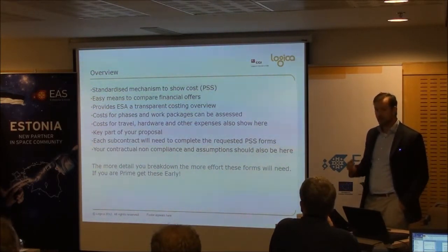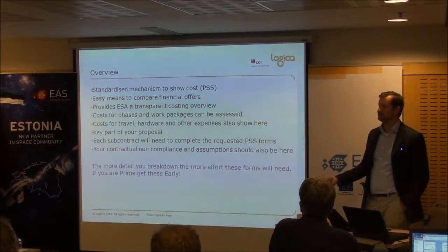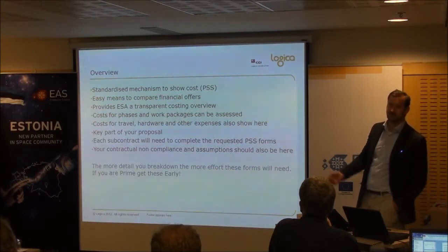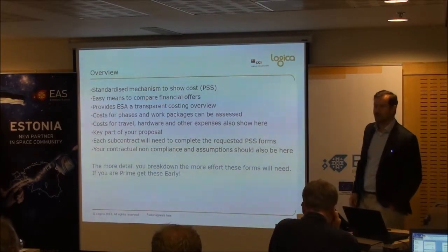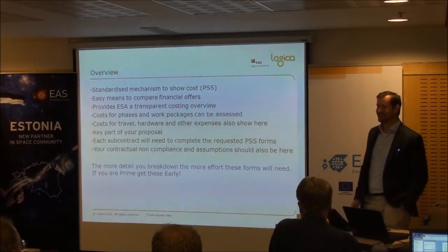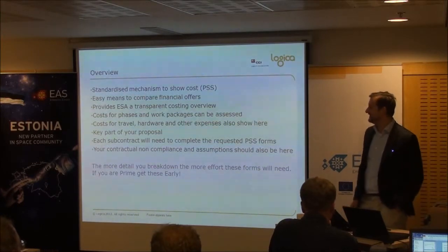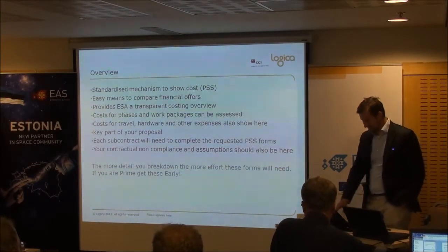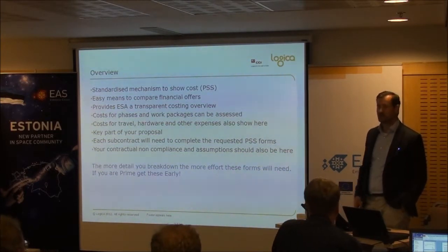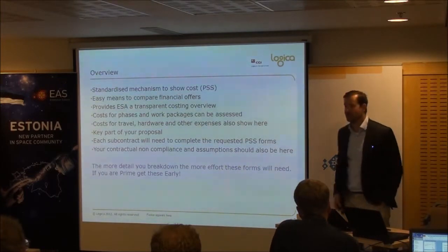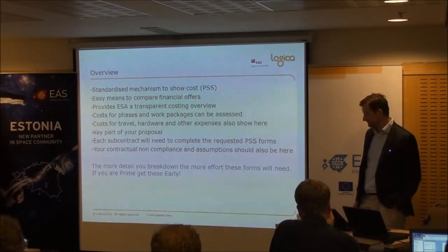As I mentioned earlier on, the more detail you put in a WBS, the more work you're going to have to do. So just don't go crazy and create this, you've got a 50k job and you've created 200 work packages. That's going to be quite a painful exercise to create the summaries for that, unless you've got some very good tools to help you. So just use a bit of wisdom. Look at the size of the job and try to consider how much effort you should go into, depending on how much financial resource you're asking for.